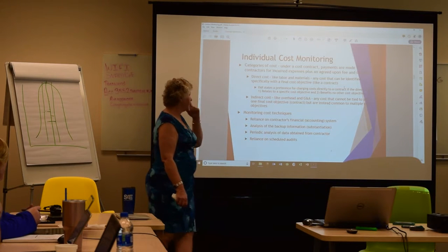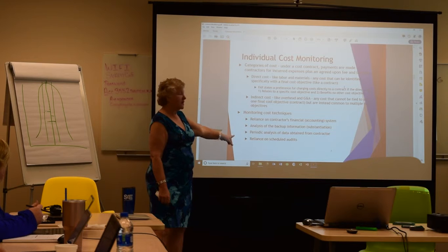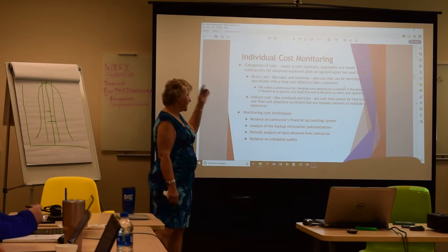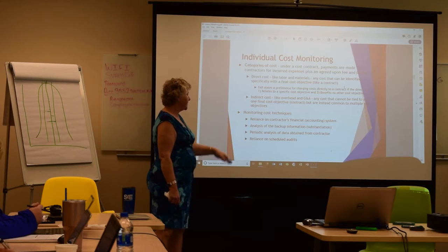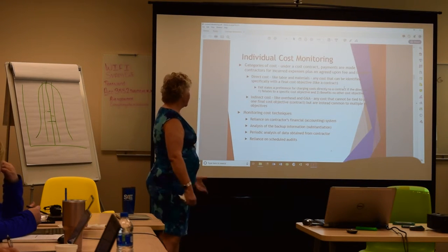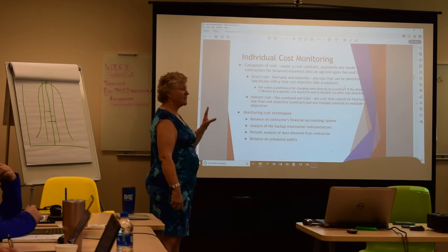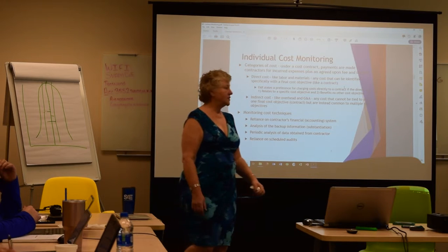How do they monitor your cost techniques? They look at your financial accounting system. They can come in and analyze your backup information for substantiation. They can do periodic analysis of the data obtained from the contractor, and they can do scheduled audits. Now keep in mind, this is done primarily in non-commercial item type contracts.